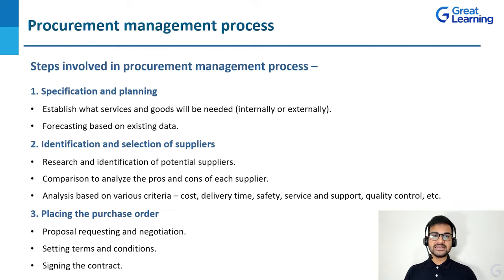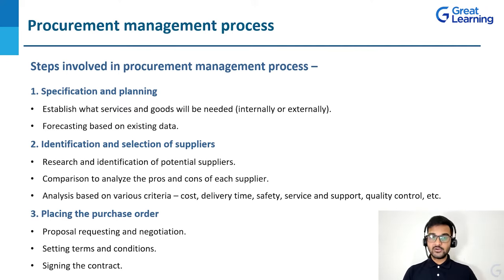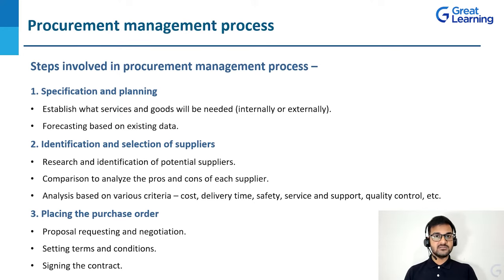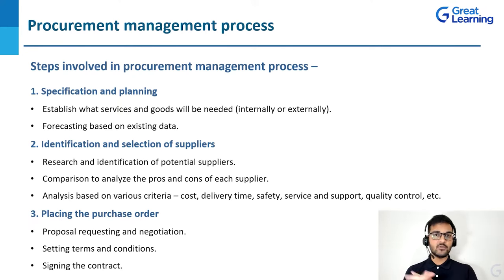Once specification and planning is done, we move to the second step: identification and selection of suppliers. You do your research, identify potential suppliers for the required product or service, and compare them to analyze the pros and cons of each supplier. You select the best candidate based on various criteria such as cost, delivery time, safety, service, support, quality control, etc. That completely depends upon the kind of product or service you need and the type of business that you have.